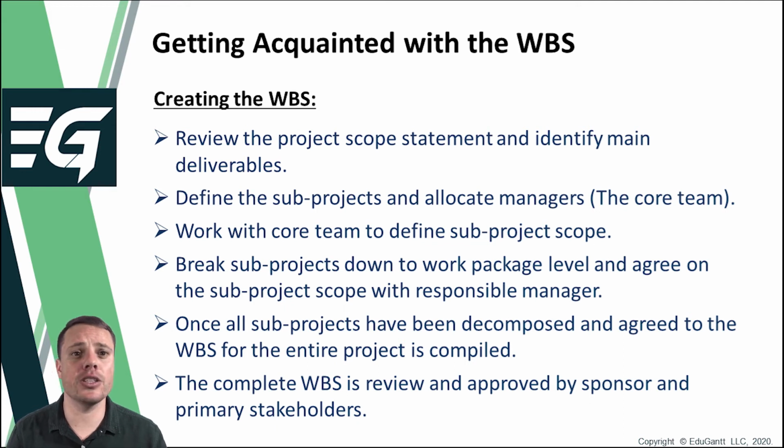And it's for this reason that it's important to consult the subject matter experts that will be responsible for the sub-project components when the detailed scope, including all the supplementary deliverables, are developed for those sub-projects. Remember that the purpose of the WBS is to capture all aspects of the scope up to the work package level, and who better to assist the project manager in making sure that nothing is missed pertaining to a certain component of the project than the person who is experienced in the field relating to that component, to whom the work will be delegated.